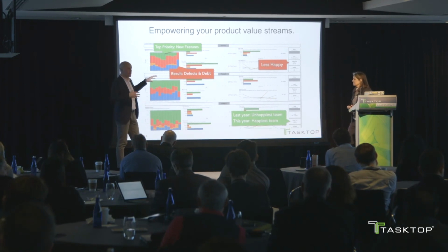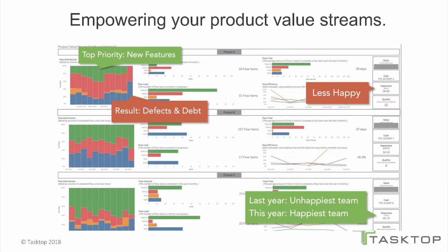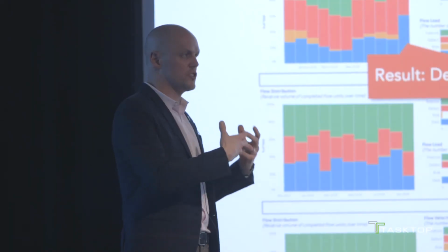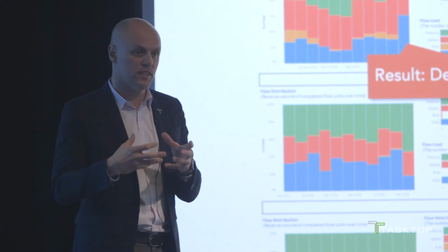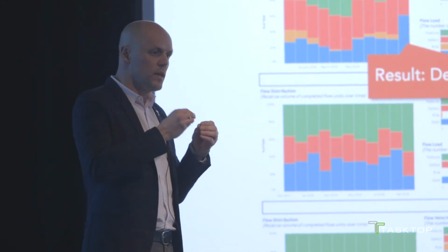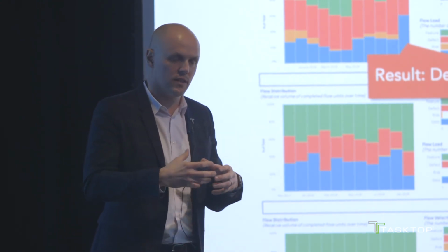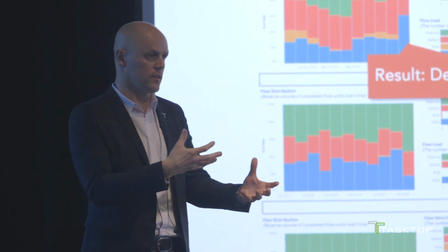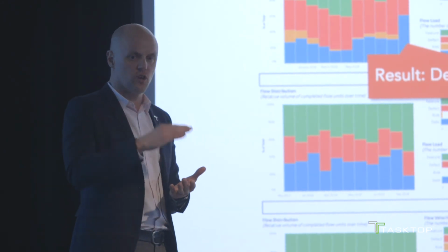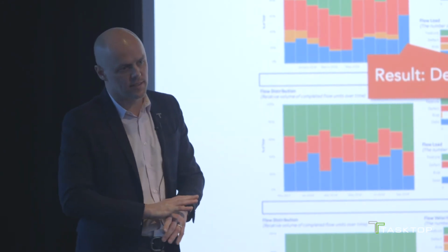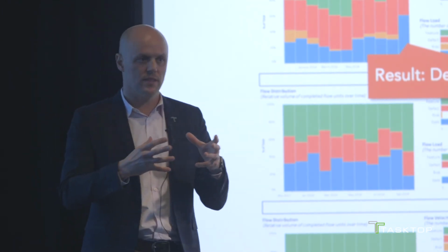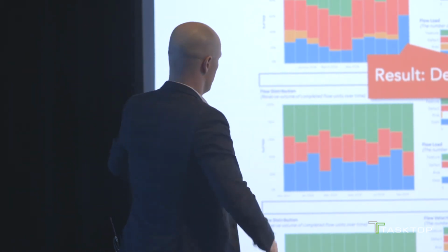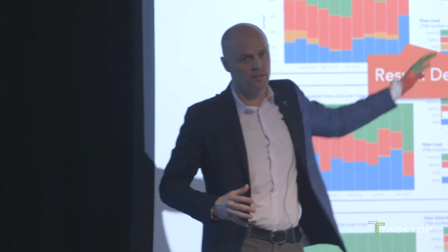This was really interesting, where that one team who had the higher flow load, who was not able to deliver those features, but felt the pressure from the business side, from our customers, from our teams to deliver those features. One of the metrics in the flow framework that's used for balance is actually measuring the happiness of the teams. In our case, through Employee Net Promoter Score, we can see that, because they weren't given the opportunity to do the re-architecture they needed, it actually caused a drop in the Employee Net Promoter Score. So with the flow metrics, we've come up with this kind of balance so that we can see we needed to give that team more time. We need to get away from this kind of flow distribution that was getting in our way.